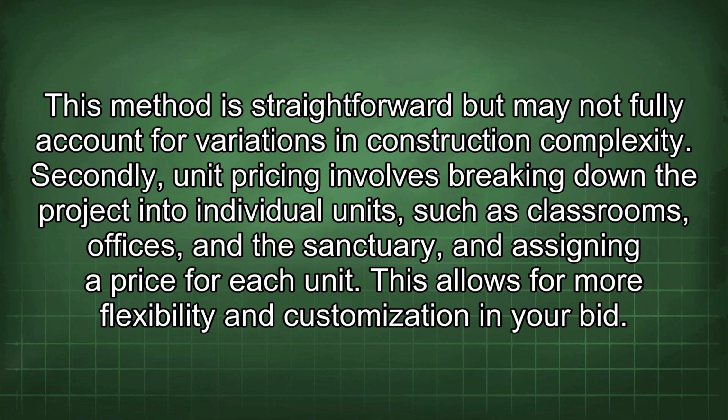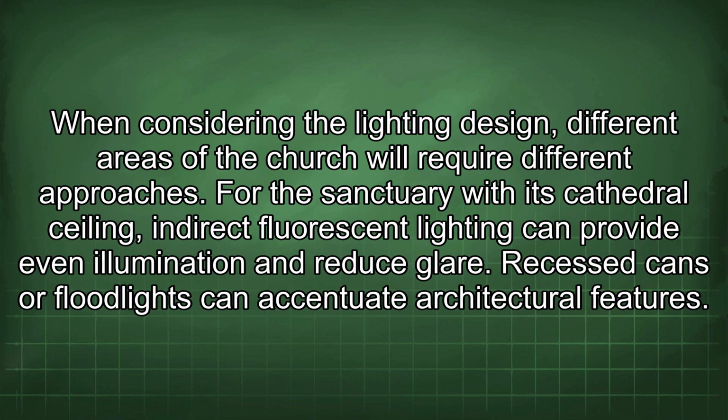Secondly, unit pricing involves breaking down the project into individual units, such as classrooms, offices, and the sanctuary, and assigning a price for each unit. This allows for more flexibility and customization in your bid. When considering the lighting design, different areas of the church will require different approaches.